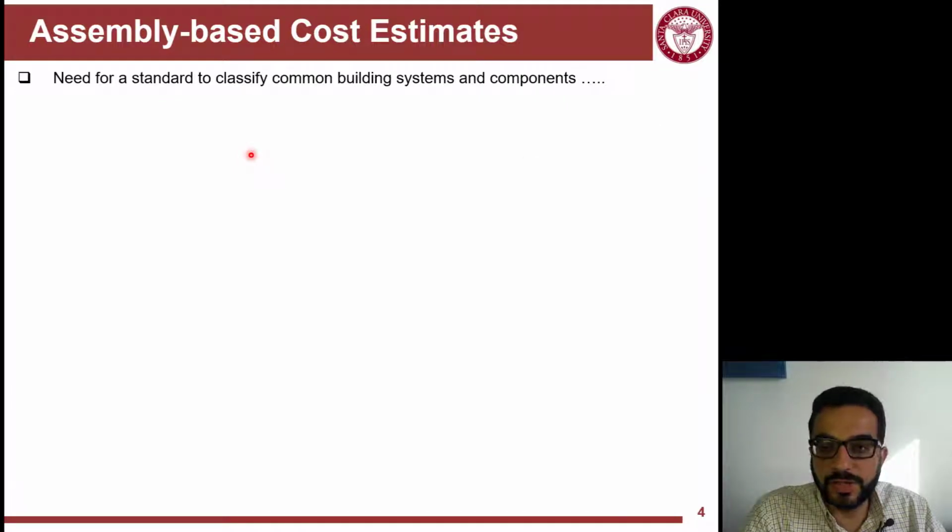Now these assemblies and their cost data need to be organized in a very standard way, so you can move the data and use it between different projects, and even between companies. And you can do research studies about what changes the cost from one project to another. So you standardize the practice of representing assemblies and also their data. Uniformat is the way, like we discussed before.